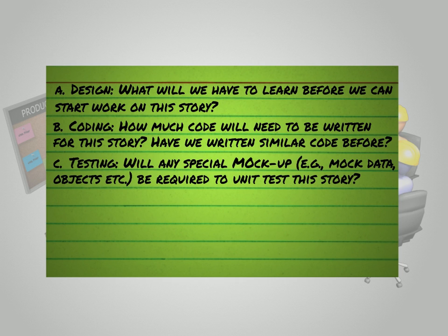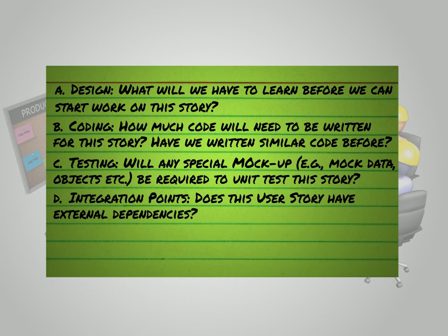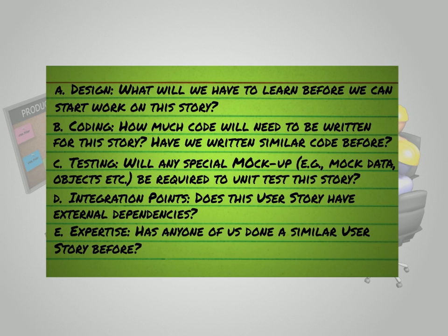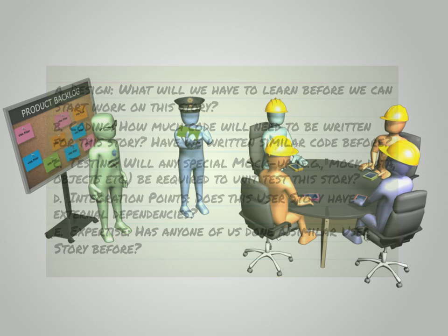Testing. Will any special mockup, that is, mock data, objects, etc., be required to unit test this story? Integration points. Does this user story have external dependencies? Expertise. Has any one of us done a similar user story before? Note that the above discussion should not take more than several minutes per story. Newly formed teams may take longer in the beginning.